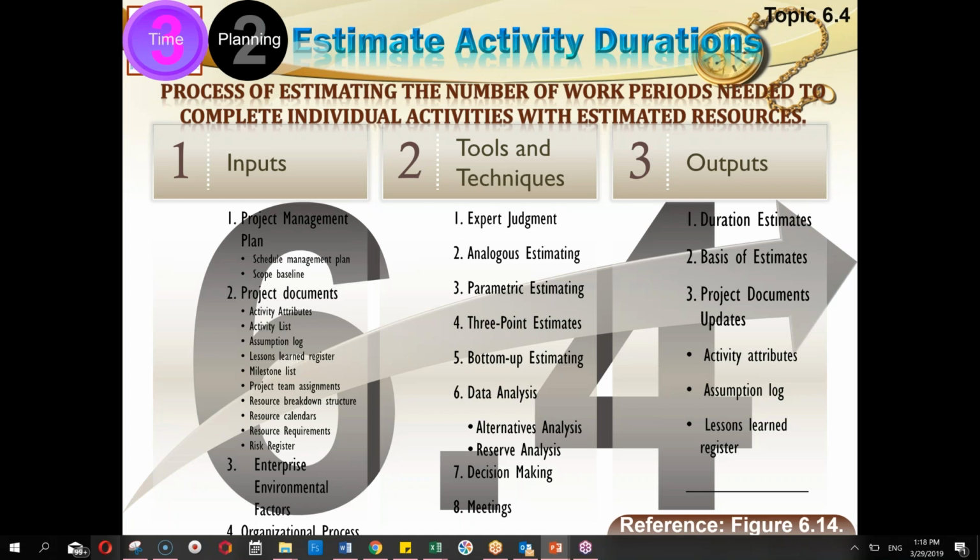And I will calculate an average result, a weighted average, where I have given 4 times weightage to the middle value, which was 3. So 4 into 3 is 12, and the minimum value was 1, and maximum value was 10. So 1, 10, and 4 into 3, that is 12. 1 plus 12 is 13, plus 10 is 23.